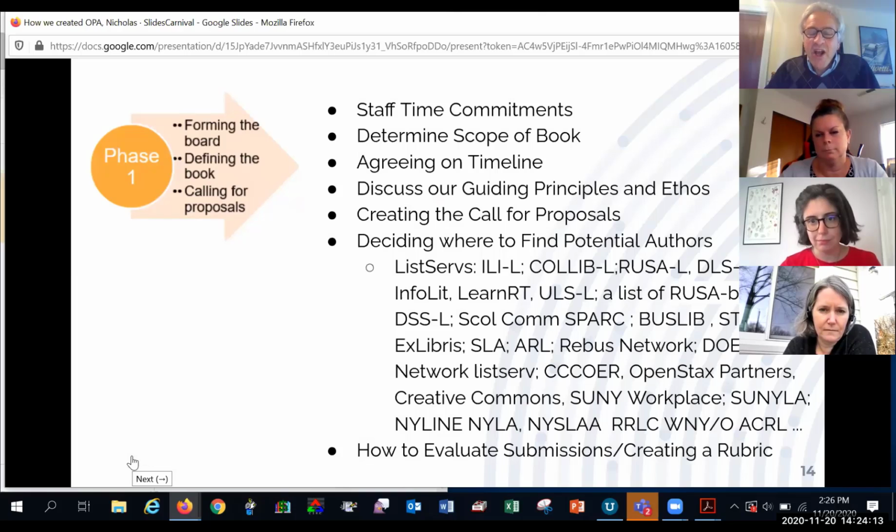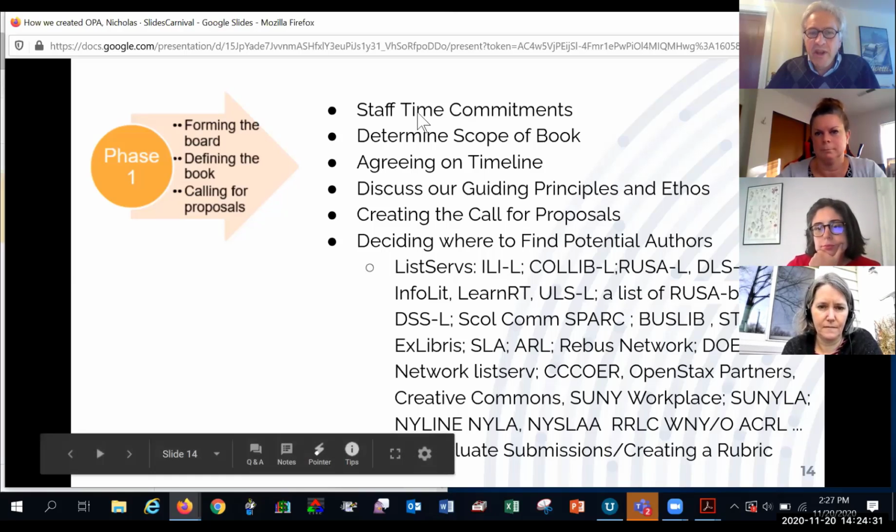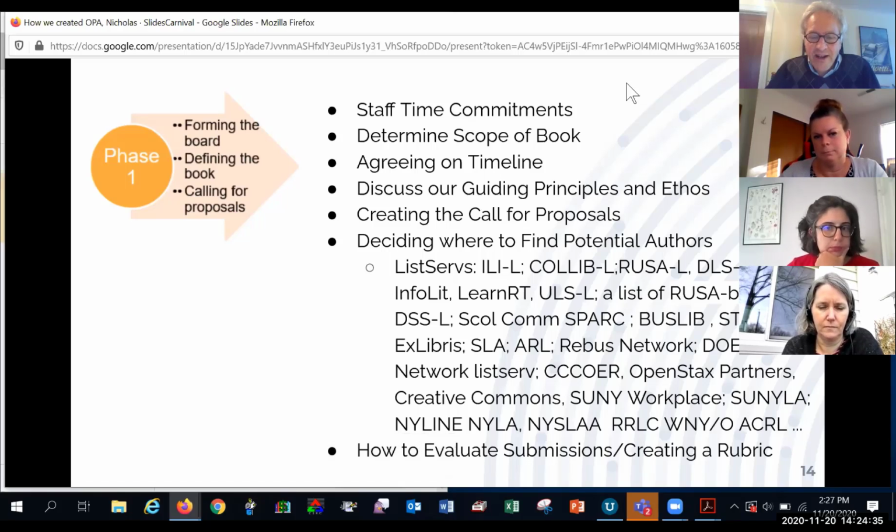One of the very first things we did, importantly, not something to overlook, was ask: is everybody who said they want to do it, do they have the time to do it? Do they think they're actually going to be able to devote the hours? And how many hours is this thing going to take over the next year or a year and a half, whatever it might be? Do we even know? We really couldn't tell for sure. We were able to make some best guesses, like it'll take X hours to review the first draft. So people really had to make sure that, once we figured it out, yep, I'm ready to go. Flying a little bit blind, but figuring we'll make it work if we want to, the people were able to figure out, yep, we're going to commit the time to this. That was the first preliminary.